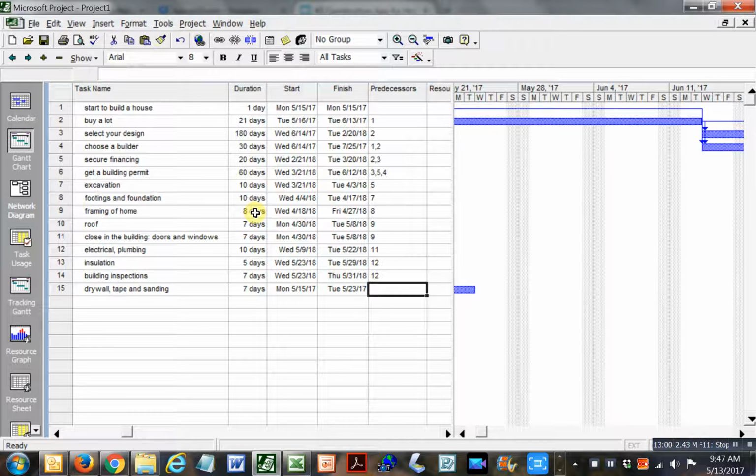You don't want to button up your building and then the building inspector comes in and he can't inspect your electrical because it's behind a bunch of drywall, right? So you have to have your inspections done, so you've done that. And now you're starting to get a little closer, so you're going to have your kitchen and bathrooms,